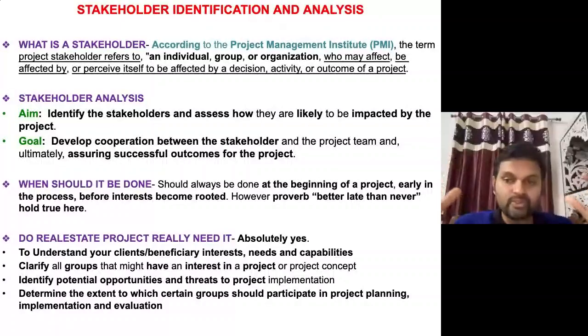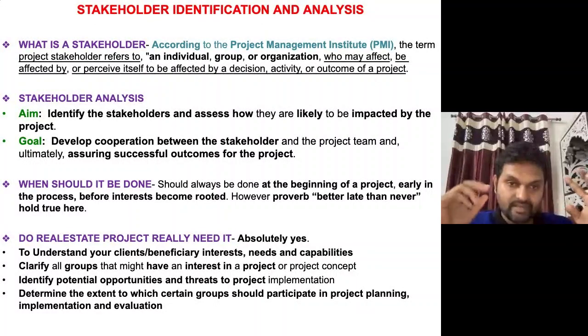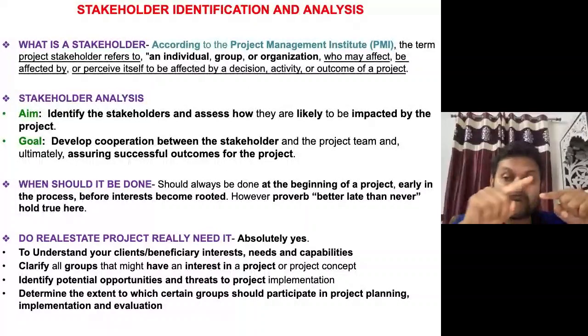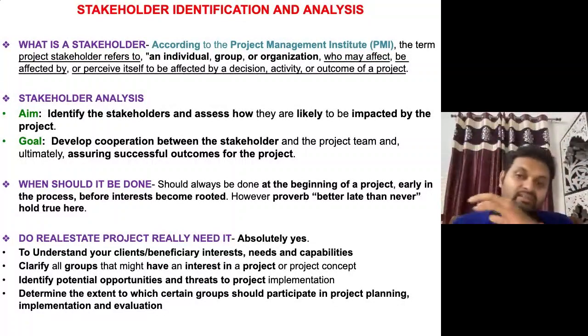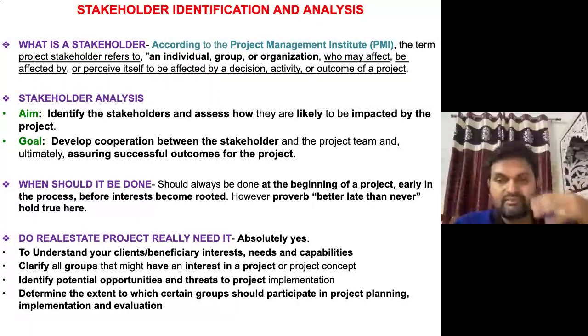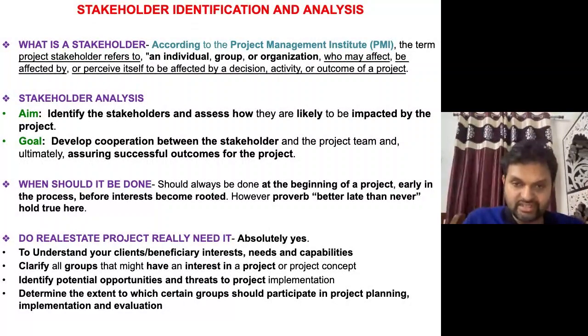One of the agencies from Mumbai claimed that if they prepare such a big statue in the Arabian Sea, it may negatively impact the sea bodies. At that time they were not able to give proper justification to the stakeholders, and that is the reason the case moved to court, and the court put a stop on that project. Now they are giving the justification, and it has been completely on hold.